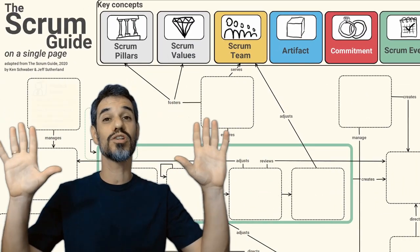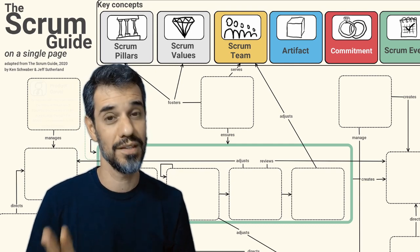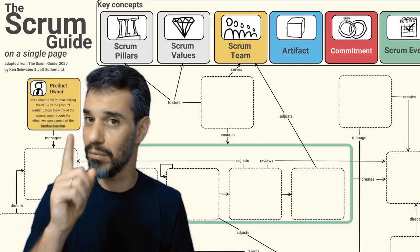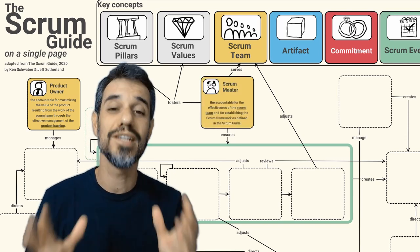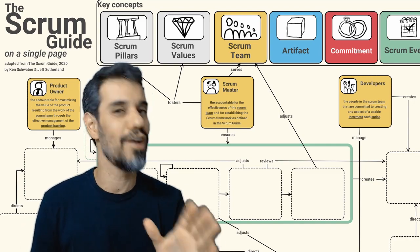Let's open now for the more specific concepts of Scrum. Let's start with the Scrum team. There are three roles in the Scrum: the product owner, one product owner per Scrum team, one Scrum master per Scrum team, and up to 10 developers.